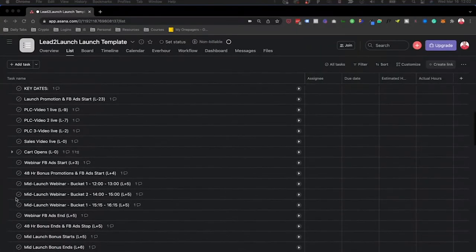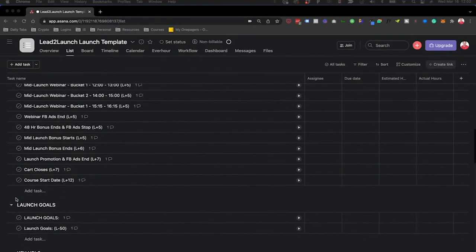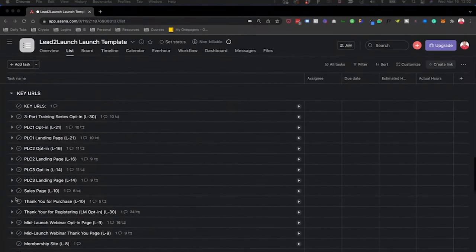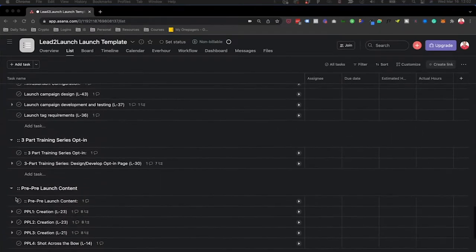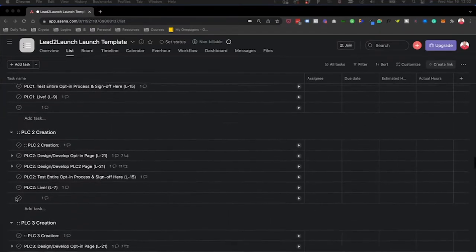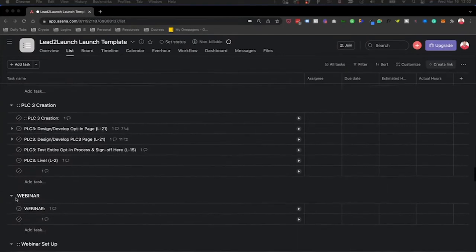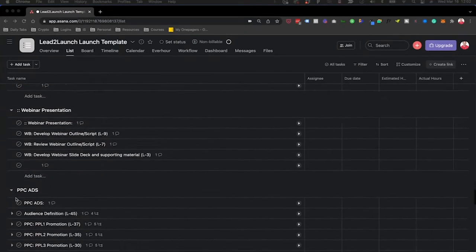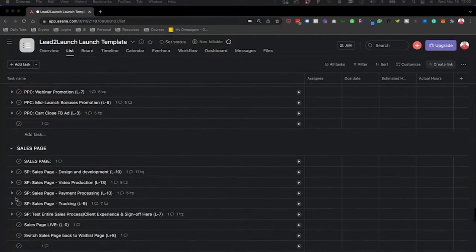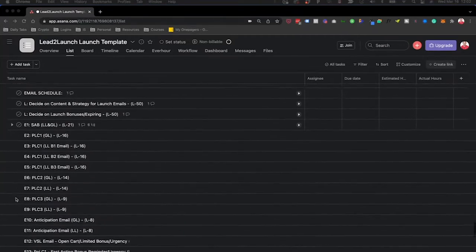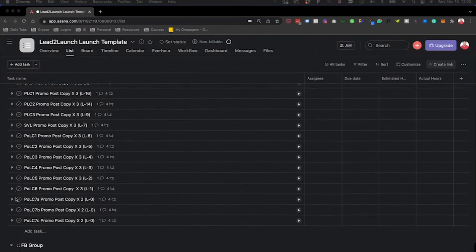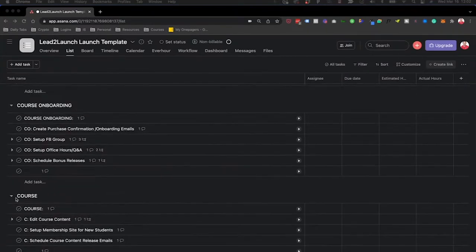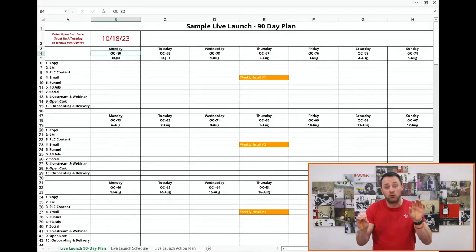You can easily import project sections and actions from Excel into Asana. Some people love Trello, others love Microsoft Project, and Monday is another tool that I've used. They all work, and a lot depends on what you're used to, but I love Asana. And if you're really visual, you can connect Asana to a low-cost online service called Instagant, which turns your Asana project into a Gantt chart view. You can then build in estimated timelines for actions and task dependencies to really see your critical success path through your launch.